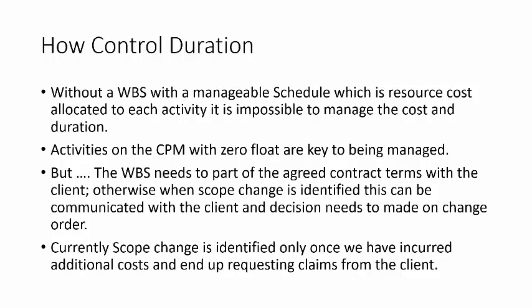Go revisit some of the projects where we have increased in duration, where we had to continue with the project. The client said continue, and he'll address our refinancing later on, and we ended up going to claims. Go back, revisit. I don't know how many times this has happened, but definitely I know we have a big claims department up there that is fighting to get us claims, and we end up negotiating with the client, whether we're the subcontractor or the main contractor.